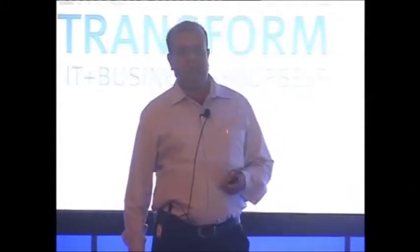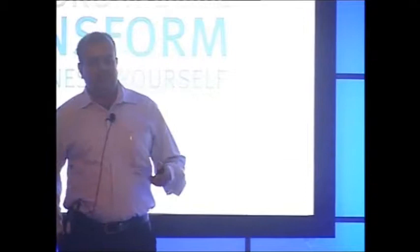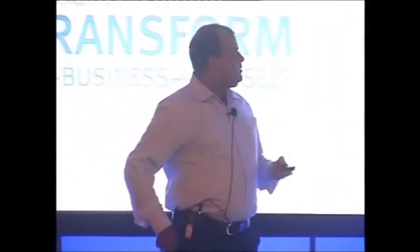It's a to and fro exchange of information where the DECs start with the specifications, which are technical specifications. And these technical specifications are given to the Reliance procurement team for them to raise a purchase requisition in SAP. Because all our POs are placed through SAP and the PR is required for that. What is next is that all the commercial attachments are attached to these technical RFQ copies, and there is a cover note. Now, what happens is that this entire RFQ is supposed to go to various suppliers, and so there are multiple such copies which are created.